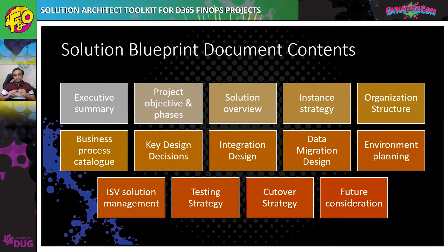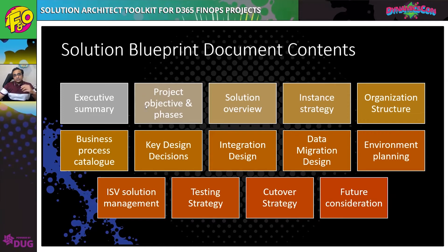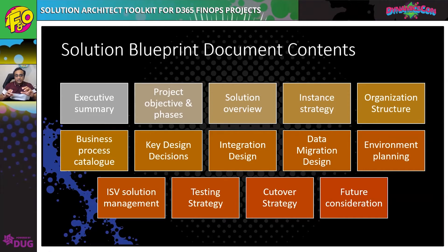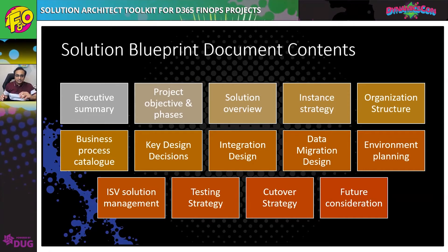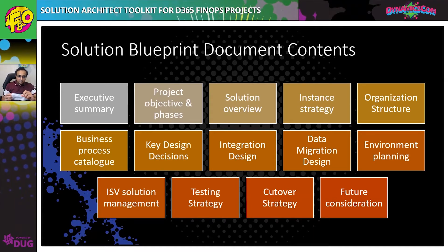Let's talk about the solution blueprint document. It is a document prepared towards the end of your design phase that captures key objectives. The executive summary section is where you summarize the key findings of the design phase. It is meant for project sponsors, who won't go into line-level detail but will want to understand the project objective, how the solution fulfills the vision, and what the key design considerations are.